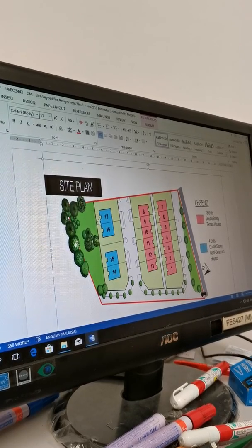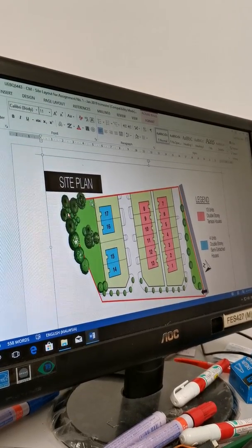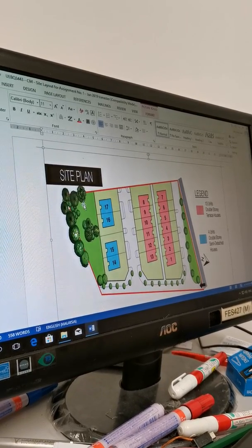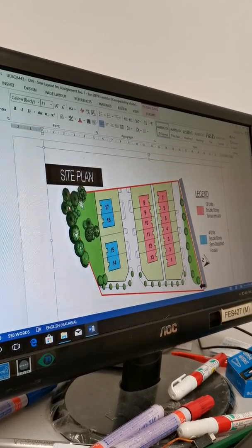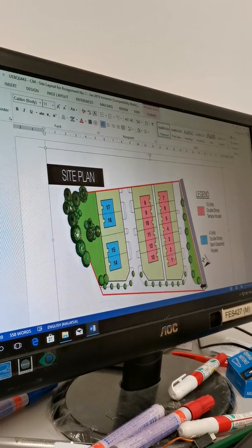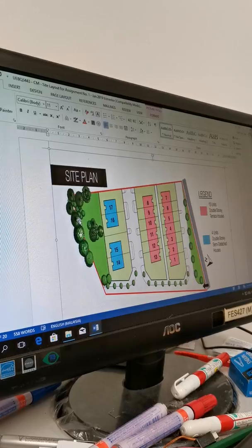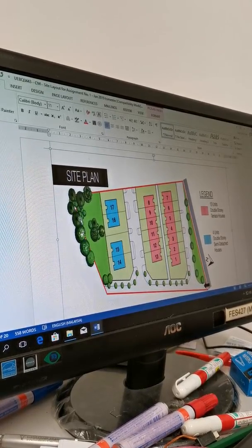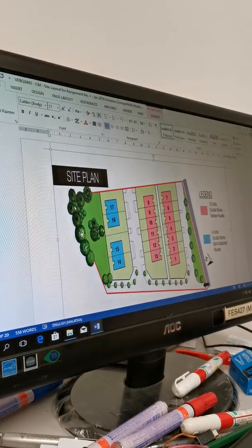So you say, okay, my canteen is designed for 90, maybe 90% or 80% going to eat there. Then you size up the tables and chairs, and then your worker quarters. If there are 90 there, each one must have a space. They cannot be sharing one, isn't it? So this is how you size up the space for the workers.